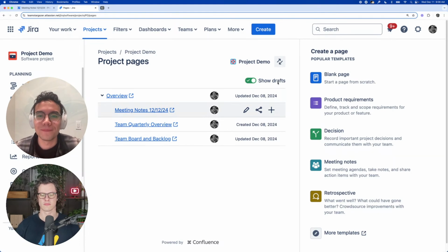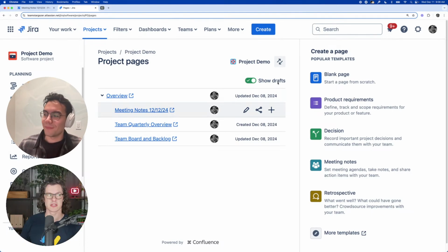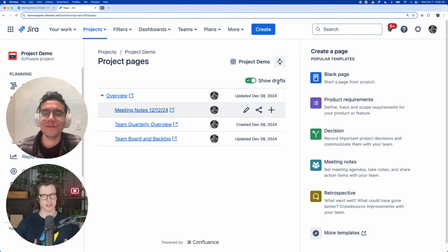Okay, all right. That totally makes sense to me. Having been a project manager and a scrum master in the past, that totally tracks. But for those of you in the audience, especially if you're working in a Jira project that's really massive, you're going to have the opportunity to connect just one Confluence space. So make that one count. Maybe if you have two important spaces, consolidate them or link between them, but you're only going to be connecting one to your Jira project. So that's probably a good thing to know.